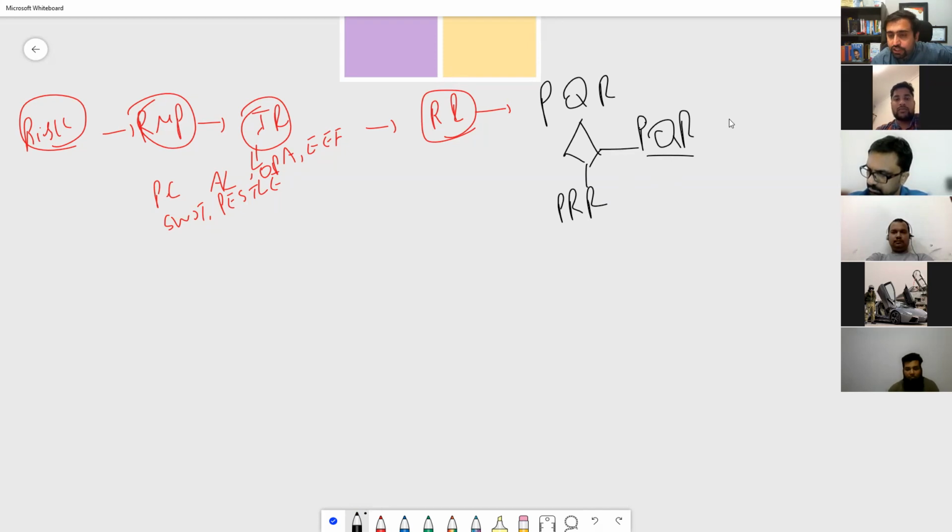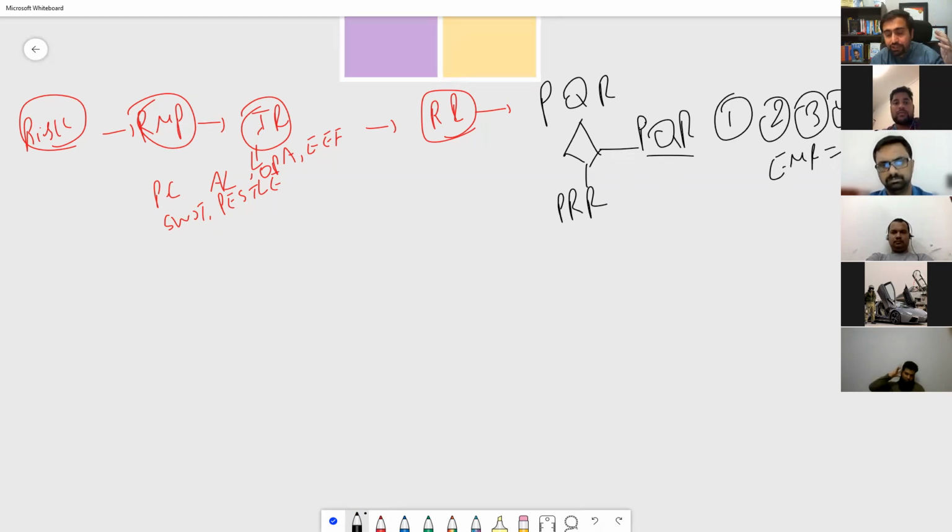But let's say we go there. We use Monte Carlo analysis for that, giving us the probability of achieving in terms of cost and schedule. We can use tornado diagram, sensitivity analysis to rank the risk. We can use influence diagram. We can use expected monetary value, that is probability into impact. We can use decision tree, that is extension to expected monetary value.